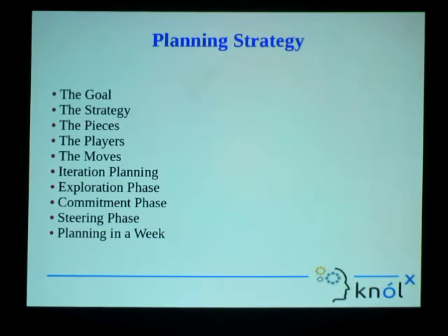After that, we create pieces for that strategy. And pieces means we separate those tasks into smaller subtasks. So we start creating pieces according to the strategy. That now, for this withdrawal feature, we need to add a new package there, or add a new module there. Then what that module will consist of, for example, that module will have validations for login, and will have an alert system and other things there for the withdrawal feature. So pieces are created for that release cycle, or for that goal.